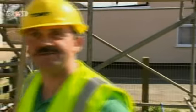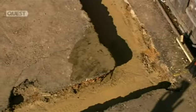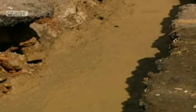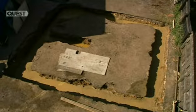That's another job done. The foundations are in and complete. It did have me worried though, I must admit, and we got away with just 4 loads of concrete, which is 24 cubic metres, so that's just 6 metres more than we anticipated. All we had to do now is wait for it to set and then on with the next stage.